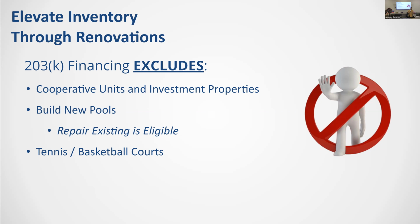And when you use contingency, it has to be approved before. It has to get sent to me, and then I have to send it to the bank with all these forms and reasoning and rationale, so people just don't blow through their contingency reserve. On a 100,000, it's 10,000. You could go through 10,000 without even blinking. Sure. A couple of days just moving walls around could be $5,000 to $6,000. You know, and money goes. So I'm not your project manager.